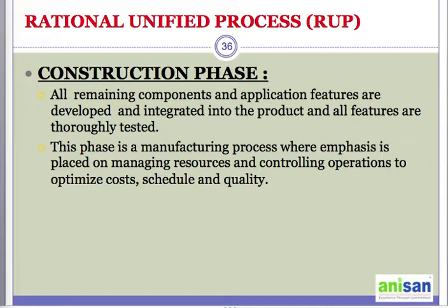So we are not just talking about implementing, but we need to put that into operations. We need people and their roles, descriptions and readiness. All this is required in order to achieve the future state. This needs to be done at the end of the elaboration phase, so that you get enough time during construction to start planning your resources, arranging and training them, right?